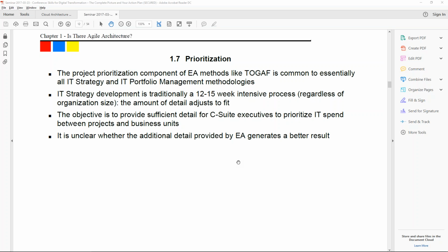What we really want to do, one of the primary things that Agile attempts to say is, historically, we solve problems by scheduling work. I want to do this piece of work first and this piece of work second. And I want to do these 5 pieces of work among these 10 teams third. Agile says no. First, second, third. We work on the first thing, we finish the first thing. We work on the second thing, we finish the second thing.